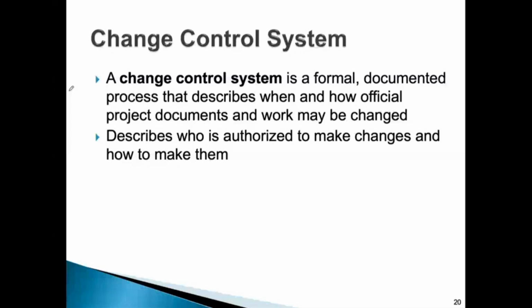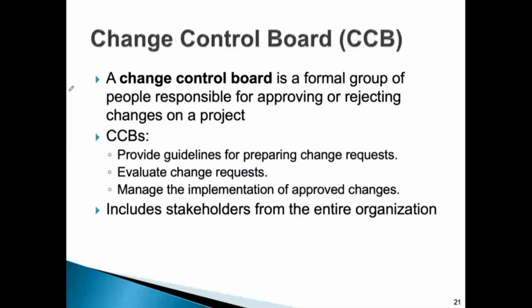The CCB, the Change Control Board, is a formal group in the organization, usually formed from people from the organization, and sometimes also from the client side. If there's a client outside the organization, he has to be involved too. This board will review all the change requests, and either approve or reject them. It depends on the strategy, the cost, and the benefits that they're going to get.